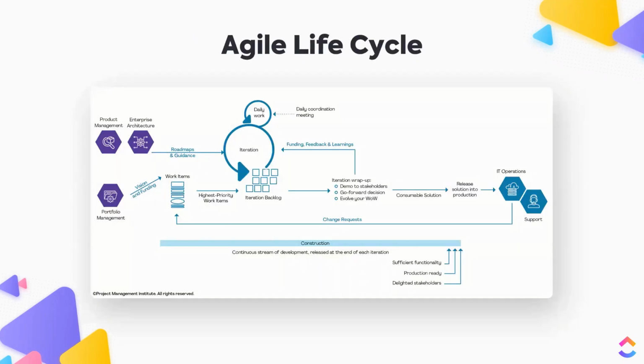The first lifecycle we want to begin with is the Agile one, because it's the most commonly used and it relates to Scrum-based iterative approach. In order to build the system, we need to create a product backlog that you can visualize right here that will hold all the work items to be done. We will break down those work items from the epic level down to the task level and prioritize them to know what we want to work on next. Then we will pull the highest priority work items and we will push them into a 2-week iteration that is often called sprint, for example, in Scrum.